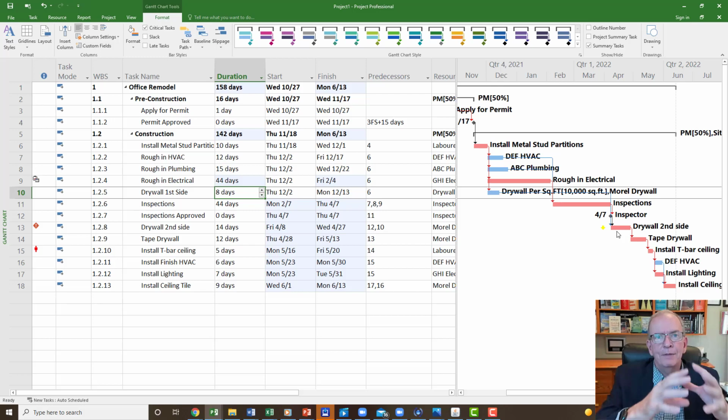But if something happens that meeting doesn't take place, that individual can't come back for another month. Well, maybe you want to flag that, it's really important. You could put a deadline on it, because it may only move a couple of days, but meanwhile now it's impacting your project, right? So you can follow it that way. Deadlines are helpful as a tool, and they don't constrict your project. That's the thing I like about that.